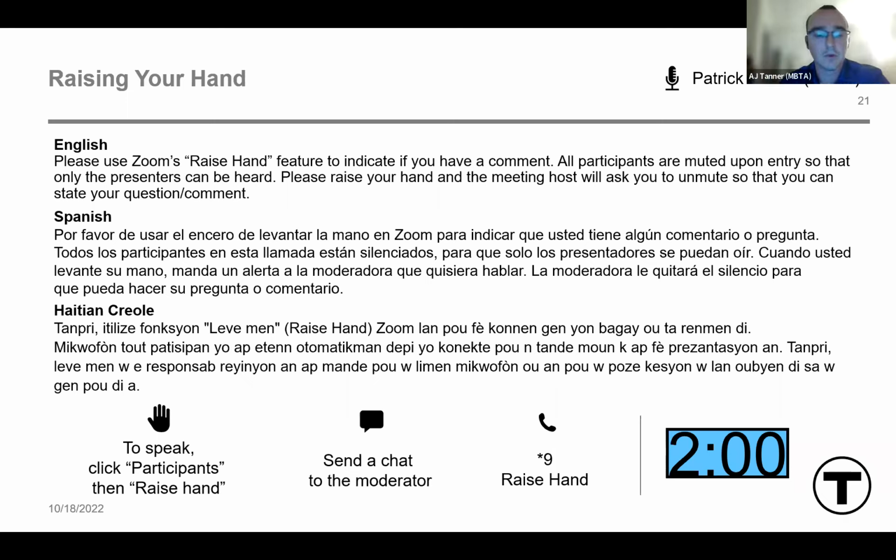Yeah, absolutely. So as part of this program, we do intend to bring the station up to complete accessibility. However, at this time, the FTA does require, if we were to repair or replace that set of stairs, that we do bring the station up to full accessibility immediately, which would include installing an elevator, elevating the platforms, etc. So rebuilding that set of stairs would really limit us in the future in terms of having space to install an elevator and things of that nature.